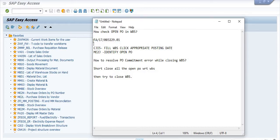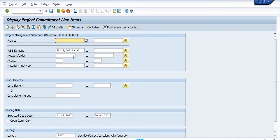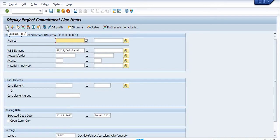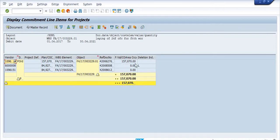There are two methods to identify whether the purchase order is open with respect to this WBS. First is CJI5 and second is ME2J. I will demonstrate CJI5 first. In CJI5, I have filled the WBS element — you also have the option to fill the project and network. I am entering the date range from 1st April 2017 to the current date, and I will now execute this transaction code CJI5.